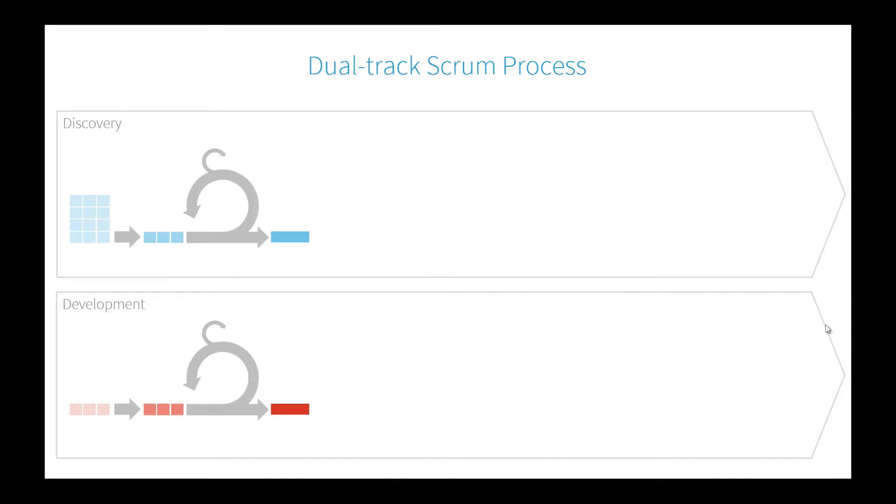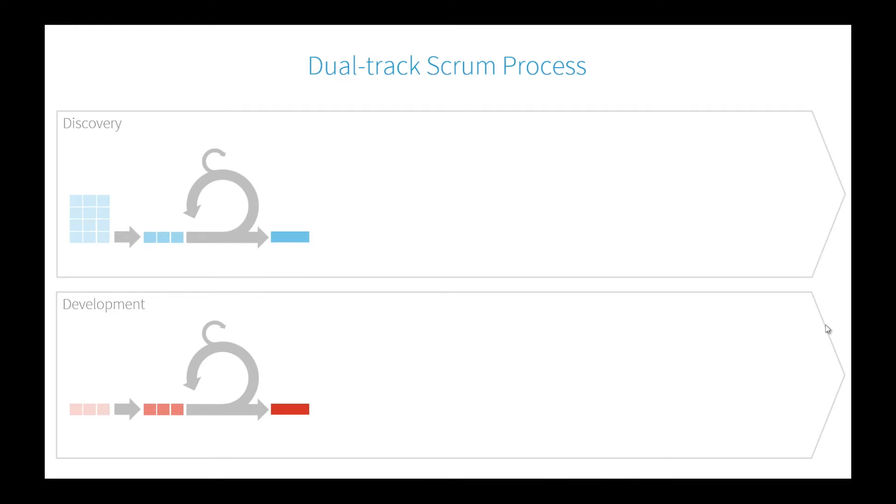In dual-track, you're essentially running both the discovery and the development track in parallel. Most of our discovery activity is design work. Sometimes you'll have technical spikes like researching integration points. You'll have a discovery track that takes its own backlog, and as it matures, it produces a potentially shippable increment—in this case, designs.